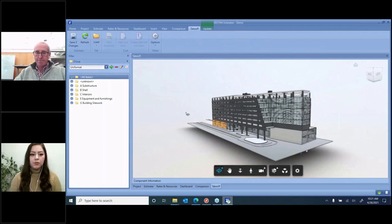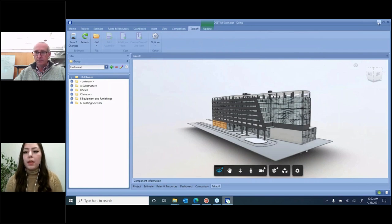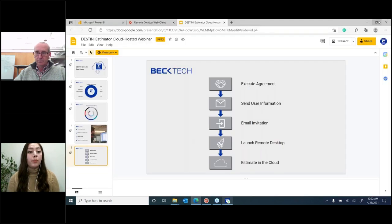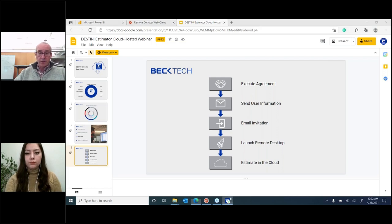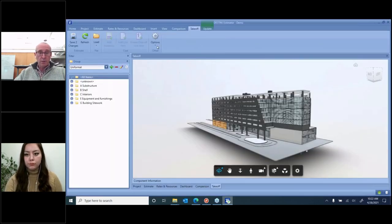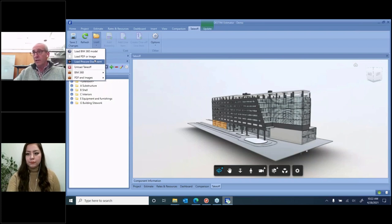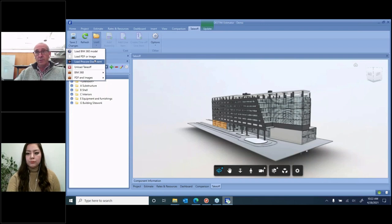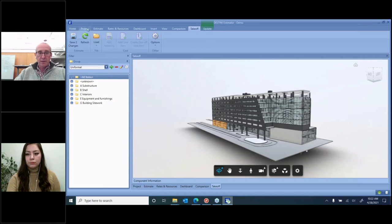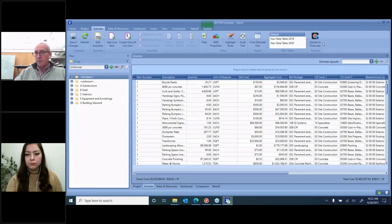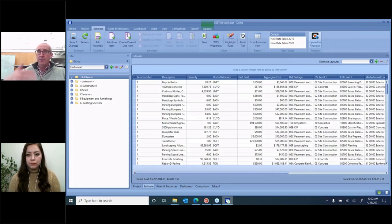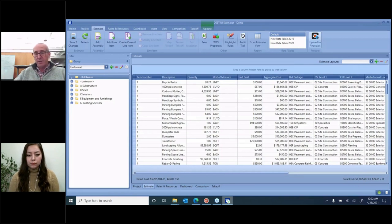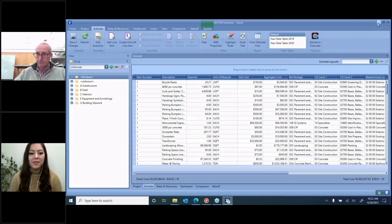Awesome. And I know you were showing a bit of 2D right now in Estimator, and I have a question coming up of, but will I be able to pull my 2D drawings and files from Procore? You can. The Procore integration still works. So, for those that don't know, on our takeoff, you have the ability that you can load a document from Procore. You'll have that same functionality that you had on-prem, where it'll bring up a login screen. You'll be able to navigate in Procore, select your document, and it'll come in the same way that it came in previously. We also have the capability in the estimate view that, once you're done, you can also push your financials, your final GMP, into Procore financials so that the end of pre-con becomes a starting point of the construction phase. Those features and functions are still available.